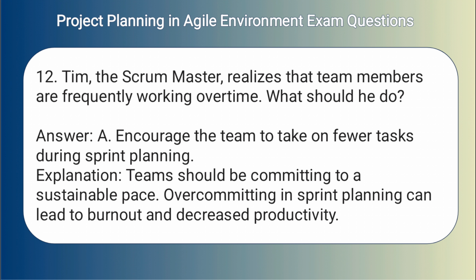Answer: A. Encourage the team to take on fewer tasks during sprint planning. Explanation: Teams should be committing to a sustainable pace. Overcommitting in sprint planning can lead to burnout and decreased productivity.